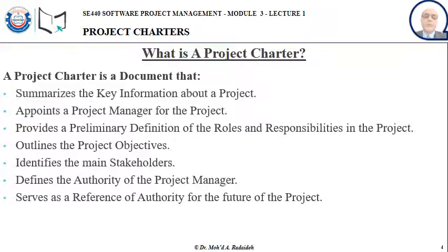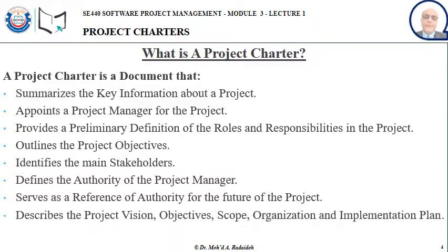And also, the project charter will be used in the future, or most likely will be used in the future, as a reference of authority. So nobody can blame anyone on why did you carry on that project, why did you accept to go for that project opportunity, especially if that project goes into trouble in the future. Then the project manager can bring out the project charter, a copy signed by the upper management, to say it was not my sole decision, it was the management decision. In summary, the project charter describes the project vision, objectives, scope, organization, and implementation evidence.